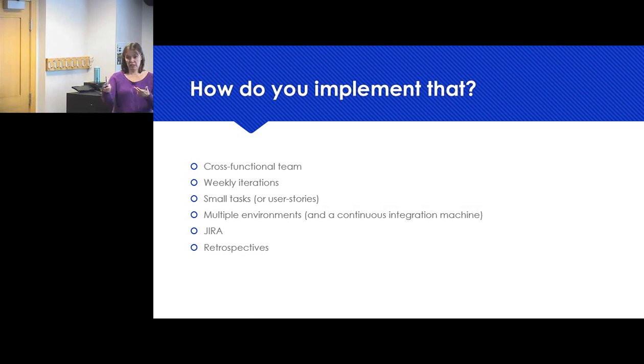So this morning, he actually said, all right, I think I'm going to break this down into a couple of cards. And so we had a quick conversation and said, all right, well, I think we want to have that switch. We want to have a toggle on there. We can do the toggle and put a blank screen with a title at the top. That's an easy, small chunk of work that we can do, and it's starting to add value. And then the next thing is we can show the table. That's valuable to the user. And then the next thing is we can actually make that table interactive.